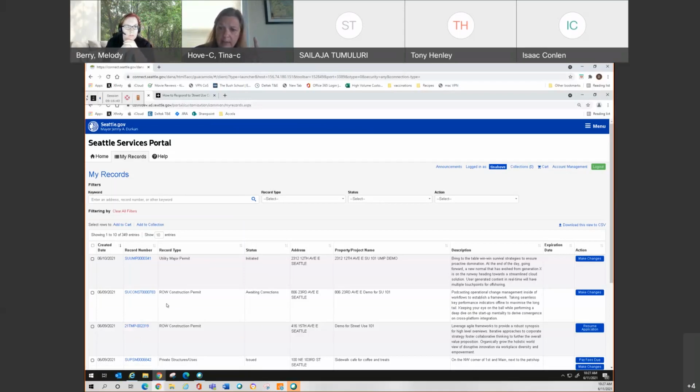One is going to be comments that are actually in the email. The second one is a correction sheet, right? That's when the reviewer keeps a list of all of the corrections you need, and those are summarized in a document called a corrections document. And the third thing is in conditions of approval. And that's really how we know, or how the system knows, that you are providing the documents we asked for.